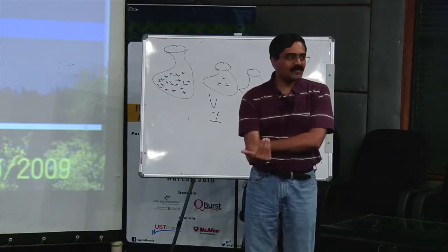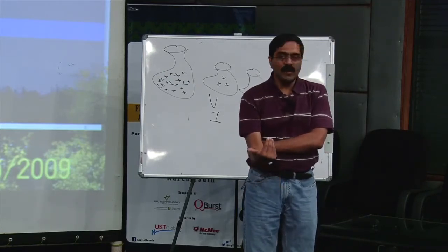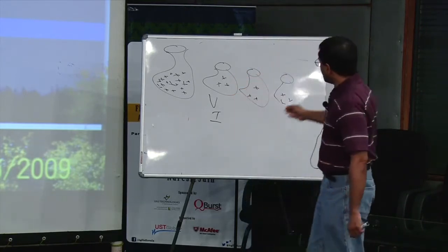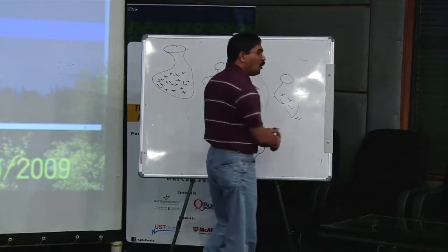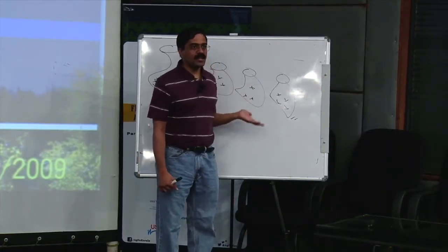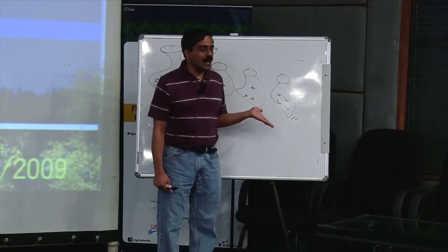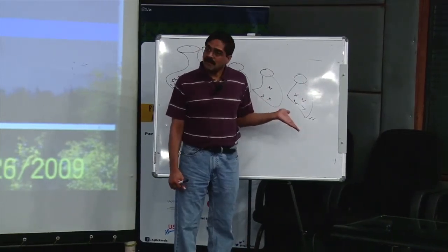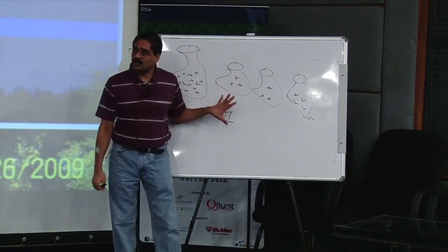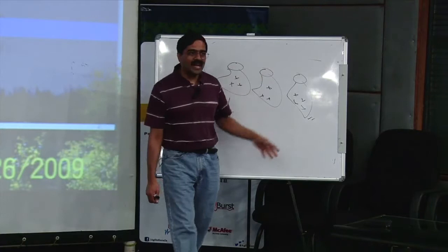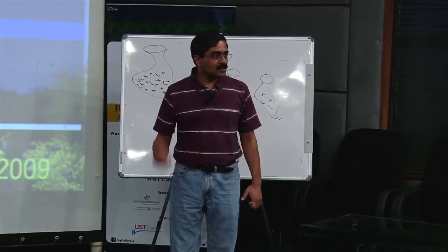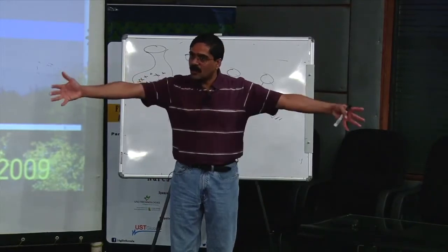So there's a cost of accommodating this. And we need to decide how important this is for you in a way that we can push some of these low value things further and accommodate what you want, and here's the cost of making the change. And we will do it. But you're minimizing that by arranging this in priority. If you don't arrange this in priority, you will keep being hit by the problem over and over and over, and that's not economical. So that is why, when I plan a trip, what do I do?